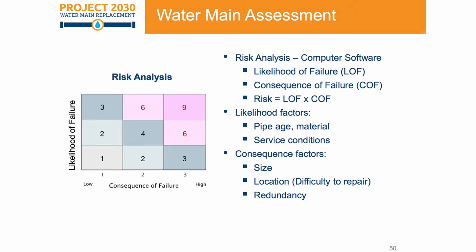And this is probably, at the core, at the crux of everything that you've heard here tonight, and I think what we're going to hear before, but this is really a function about risk. And I think in our everyday lives, and I think we have an exercise that we're planning on having here in a little bit, we deal with risk in our everyday lives and everyday decisions. And so for a water district, when we're looking at water mains, it's really about the likelihood of failure and consequence of failure.